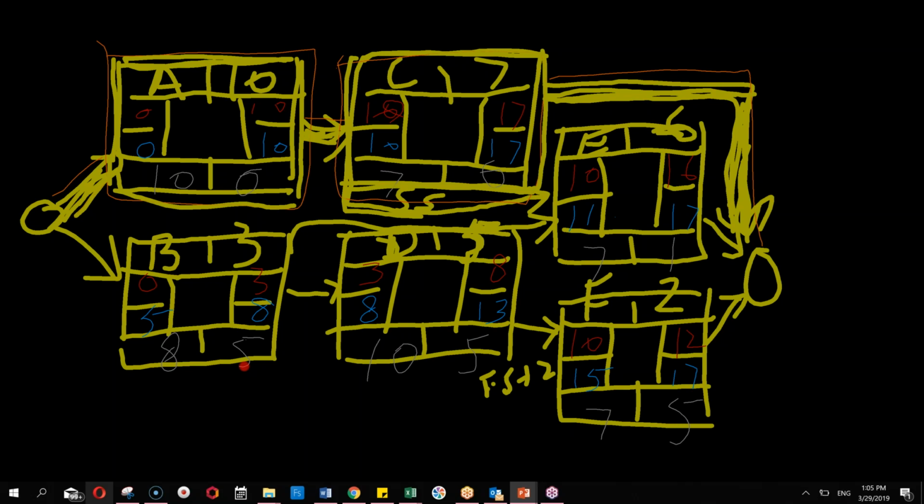Project cannot, not the maximum, is the minimum duration the project can be done. Project cannot be completed before 17 days. So this is the minimum duration, but out of the paths available, this is the longest path. Within the project, out of the many paths available, 17, 16 and 12, this is the longest path. But this 17 days represents the minimum time the project requires to complete.